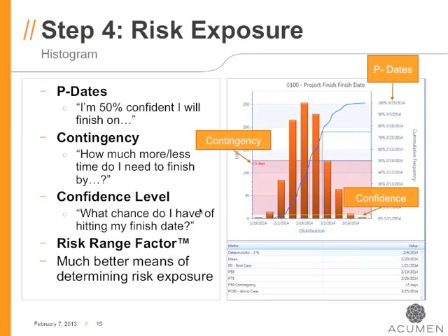Well, that's a simple schedule with 2 parallel paths. Take a true schedule, even with 50 activities, which may have 4, 5, 6 parallel paths that all converge to first gas. That confidence level is inherently going to be very, very low. So I would actually throw out there that confidence level is somewhat of a fundamentally flawed risk metric. And in fact, I would use confidence level as a means of reporting how complicated your logic is.